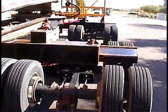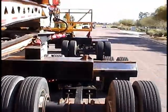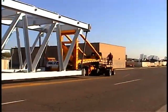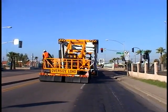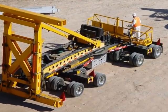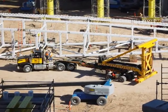This allows the transport equipment to travel normal highways at a moderated width, expand to 20 feet when approaching a bridge and thereby obtaining the dual lane loading allowance, and then contract again to 13 feet on the other side, all without stopping. One of these dollies was used on the rear of the Schnabel equipment, and another with a gooseneck attachment to form a Jeep was used on the front.